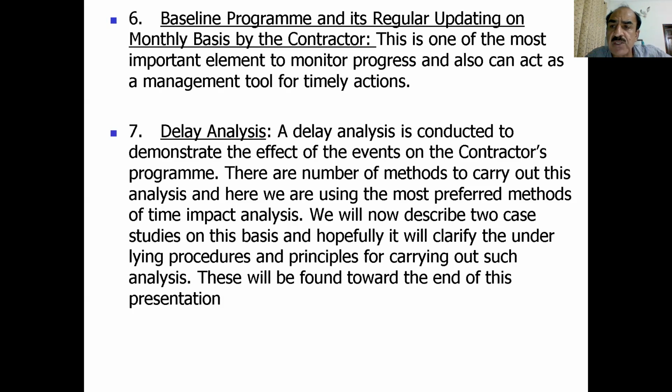So my request to all the engineers would be that at the time of construction and contract, we normally need the contractor to develop his master plan or programming. And even if it is not obtained at this stage, normally this is not very detailed at this stage, but when we are signing the agreement and when we have the kickoff meeting of the project, then certainly we would require that there must be a well-defined and well-detailed master programming of the project.